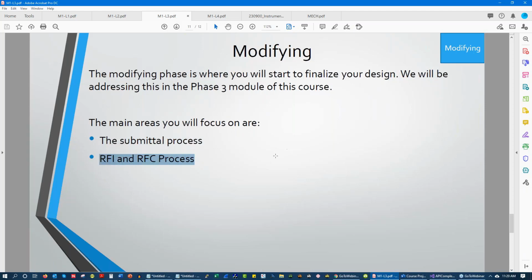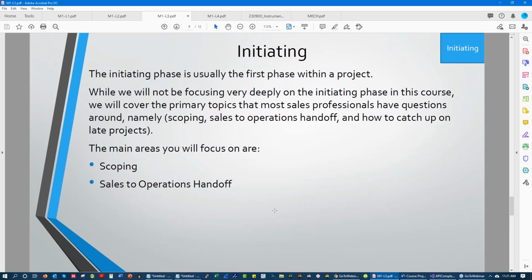You need to have them red line or circle or whatever the issue, document the issue, and then you formally document your response to that issue. And then you get them, whoever it is, to clarify that that response was adequate. This is not something you want to do via email, where you could do that in the initiating and creating phase.